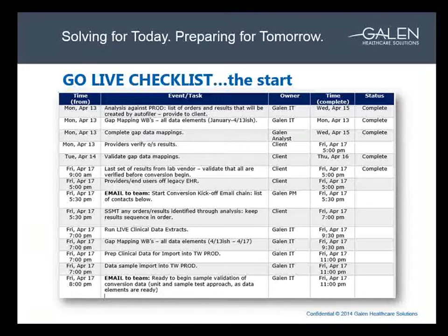One thing that isn't really on here that you often see with any kind of conversions or upgrades is a database backup. That's really a client decision as to whether or not they feel there's enough risk to merit a database backup. In the example that we have here, the client decided that, unlike an upgrade where you're changing the actual application and features within, with a conversion you're just pulling over patient-specific data, and they felt that the time invested into the database backup wasn't time well spent, and so they opted not to do that. But yet again, another example of something that can be talked about and worked out with the client.